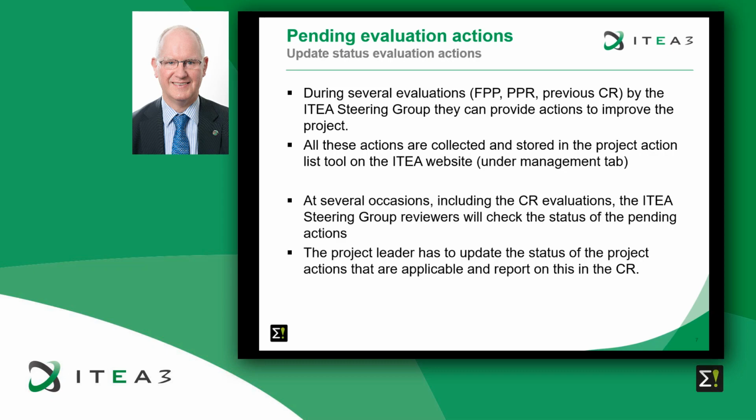And at several occasions, and that also includes the change request evaluation, the ITEA steering group reviewers will check the status of the pending actions from previous evaluations. So the project leader has to update the status of the project actions that are applicable at that time and report on this in the change request.